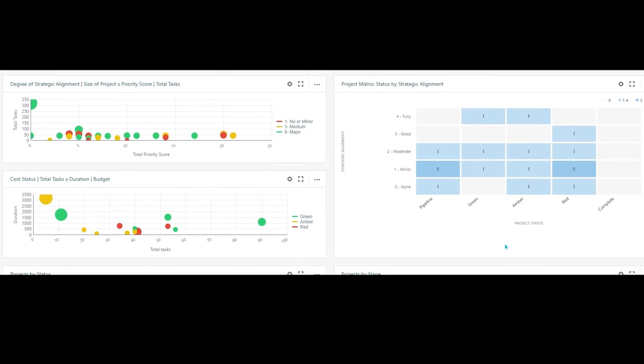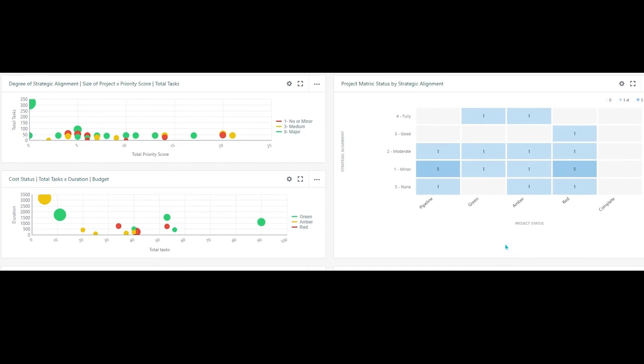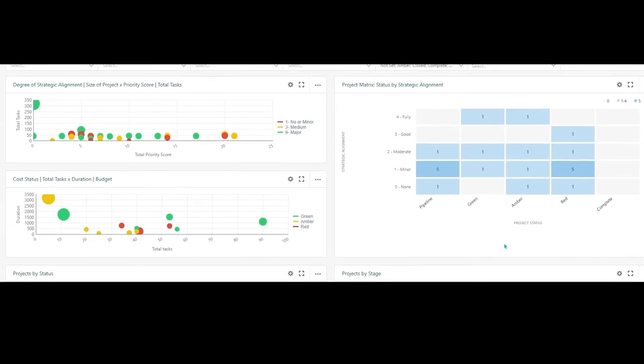In this widget, I am able to see each project based on its size, priority, and level of alignment to my strategic initiatives. Furthermore, using this matrix, I can see which strategies aren't being supported, allowing me to balance my portfolio.